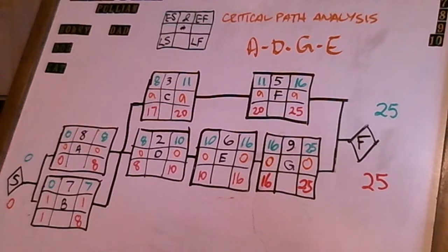Subtracting the early finish date of 7 is telling me that I've got a float for that activity of a single day. And you can do the same calculation and get the same answer if you use the late start and the early start dates. For us in this case, it is going to be activity B having 1 day of float.